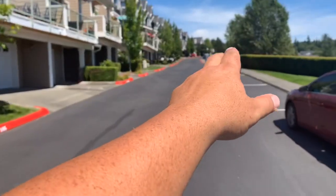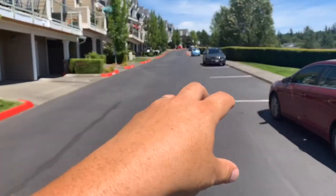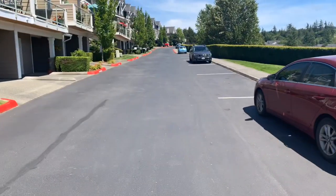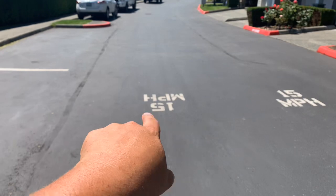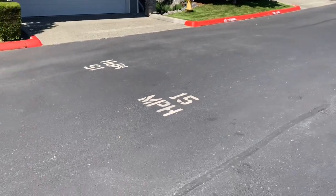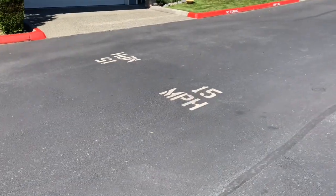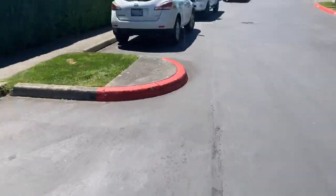When we come back the second day to do this side of the road up there at the intersection, we'll seal coat that. We'll put the 15 mile per hour stencil down where it needs to go. We can actually put on either day. And then we'll come down here and we'll do this side, and we'll cone this off, black it out in a nice square, and then seal coat it. Okay, I want to make it look clean, so use masking tape and just create a square, or if you got like a wood frame that you're able to put down and seal coat inside of it, do that. But I'd probably say just tape a square, black it out, seal coat it. Okay.